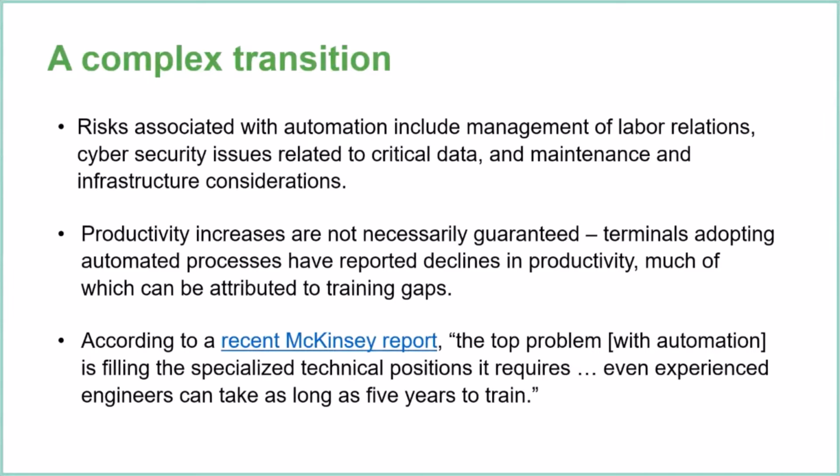So it was done to eliminate the responsibility of the customer, the terminal operator, when it was time to integrate, test and eventually go live, with the finger-pointing session that I talked about. But that is very recent. Ashdod was the first one to go one step higher at the time.